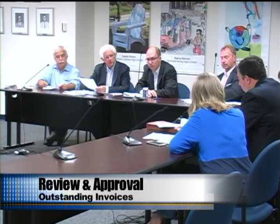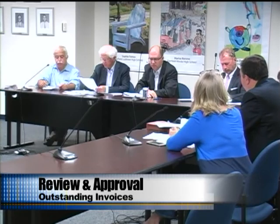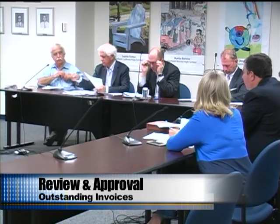And if I may, one other thing. I know that we approved the deck, the handrail, guardrail change today, but the Finance Subcommittee has not seen the backup to those dollars, and I know it's listed on DeStefano Chamberlain's as $8,893, but we hadn't had a chance to review that yet. Do you have the change order request? So I just want, for the record, I understand that the committee just approved the change of the system. I don't think we've approved the change order yet, as far as the final dollar value.